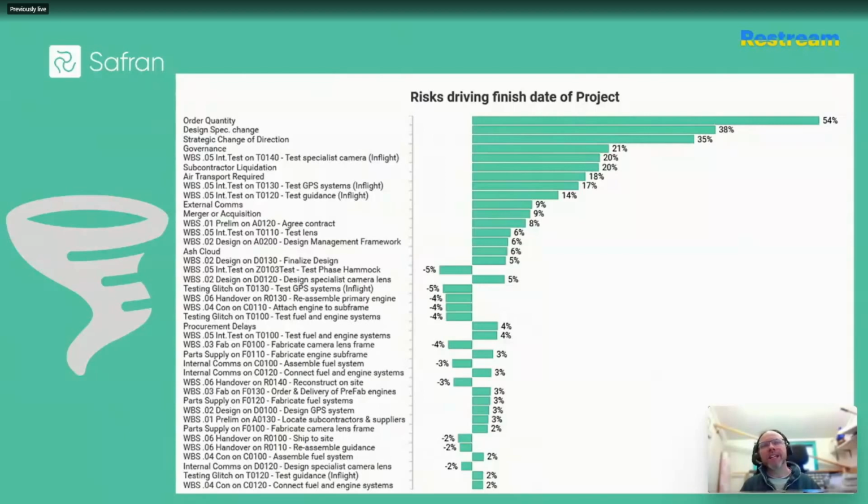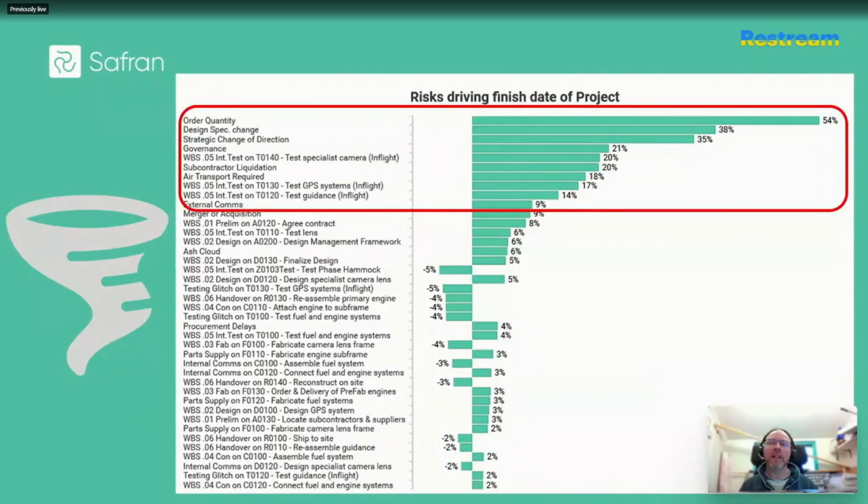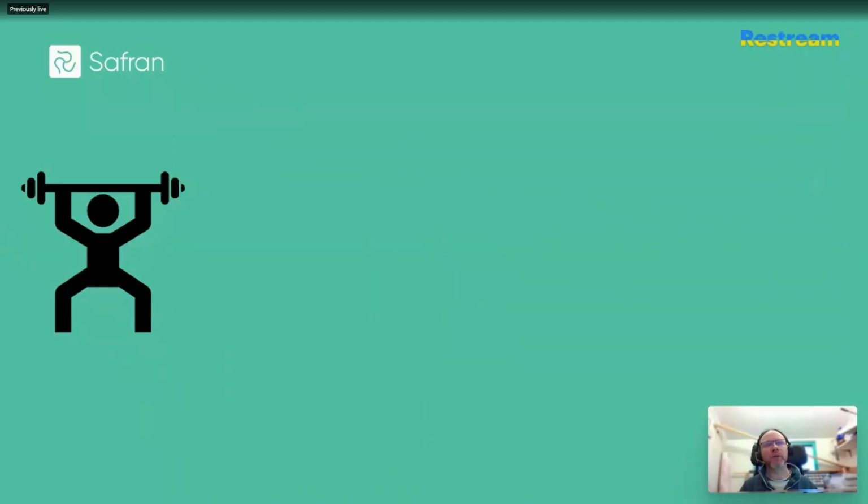These styles of report instinctively tell us two things. One, what is most driving a project's risk analysis and therefore where to best prioritize your team's energies. And two, it also shows where our existing plans may reveal potential cost or time savings, perhaps as a buffer or a brake against the other negative effects in the model.